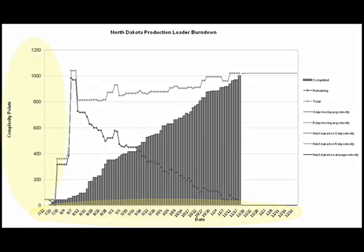The vertical axis is shown in units of complexity points. The team breaks a project down into stories, each of which is estimated using a scale of tiny, small, medium, or large. Each of these is twice the size of the previous one and has a point value: 4 for tiny, 8 for small, 16 for medium, and 32 for large.